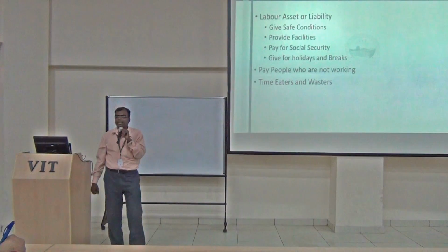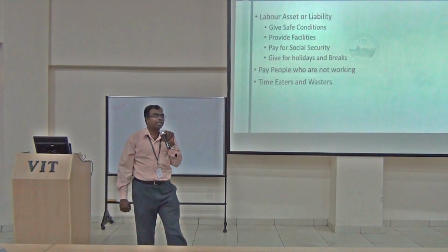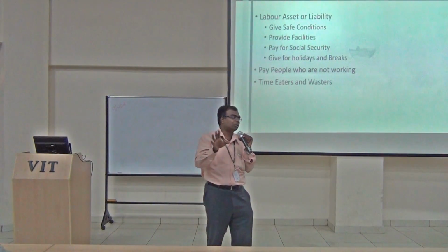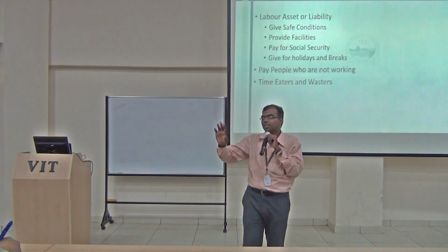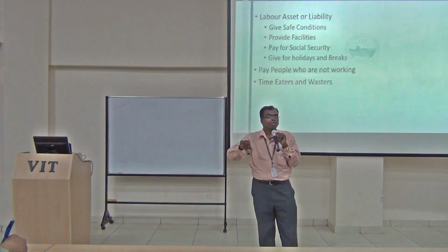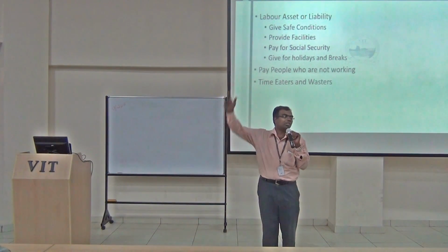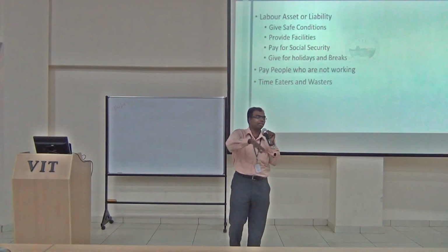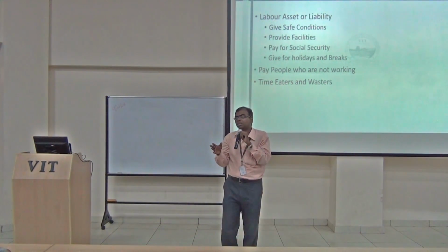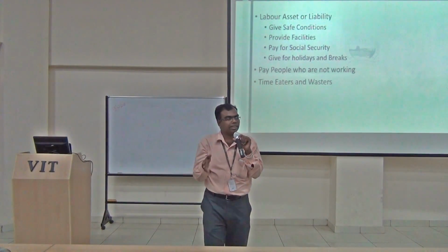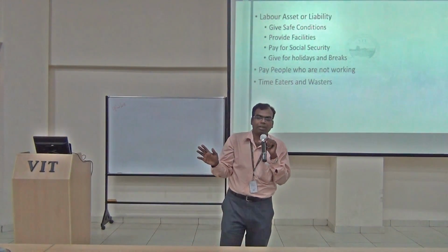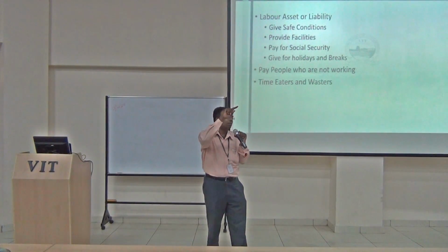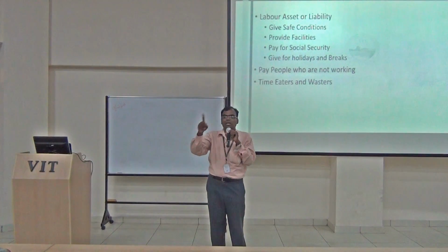Okay, I will state one thing which my brother did when he was in Kudankulam plant. Inside the reactor building, you are not supposed to do any eating, drinking or any other thing. When you look at the reactor, it's a 10-story high building. You have to go up 10 stories, come down 10 stories to come to the working area. So he got a special permit from the NPCL stating that if any damage is there, we will make good. But see what happened was they saved about 1 hour per session.